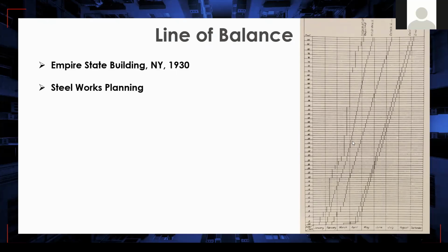From the first insight, what we can understand is that these 2 activities, delivery and execution, follow a really tight schedule. Any delay of the delivery activities will automatically delay the execution of the project. So we need to make sure these tight schedules do not affect our project progress.